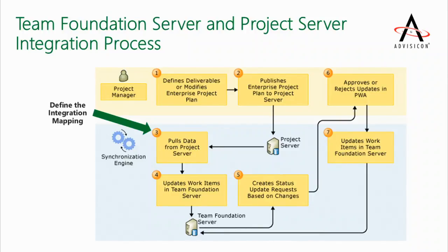Number 6 talks about approvals or updates. And remember, Project Server has, by default, the ability for the PM to say, well, thank you, Mr. Team Member. You just entered remaining work at 8,000 hours when you meant to put 80. And when you hit submit, it doesn't just roll right into the database and blow out your schedule. So you have an opportunity to review and approve that, not only from Project to the Project Server environment, but also from Team Foundation Server if that information comes in. That flexibility allows the PM to stay in control of their schedule even if pieces are being managed or edited in different places. And of course, finally, once we approve that, it should rain back down to the work items in Team Foundation Server.